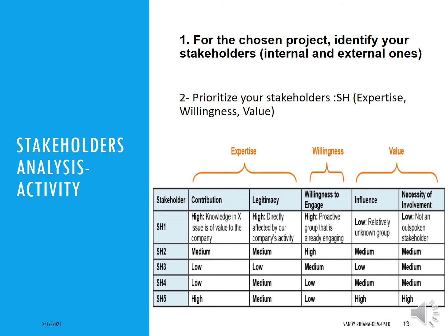Willingness is how much your stakeholder is willing to engage. Some sponsors, for example, give you the money for the project, but they don't want to deal. They invest, but they just want the result at the end of the project. So in this case, they are not willing to engage, and it should be low. Other sponsors will be willing to engage and follow in detail. The project manager should have very high willingness to engage. Nevertheless, the government maybe is not willing to engage if the project is not related to the government. You only need a certificate or a form from the government, etc.